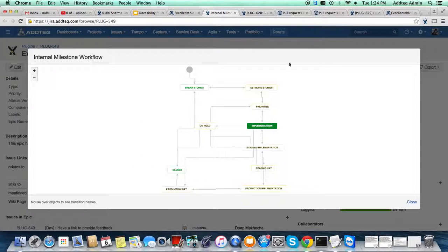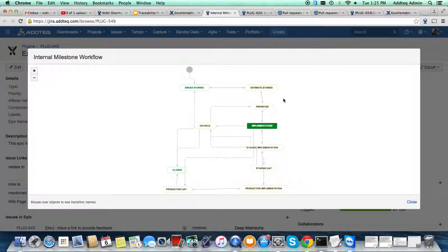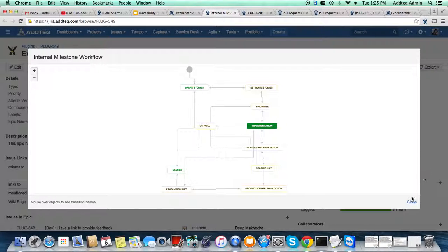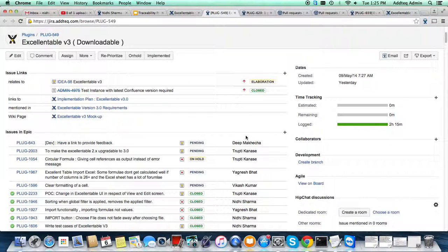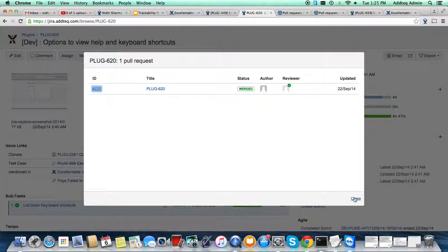This is the workflow — we have created our own as per our need. Based on a company's requirements, we can create customized workflows too. This part covers breaking stories, estimation, and prioritization, which is related to requirement management covered in Confluence. In the implementation phase, to achieve one feature we have multiple stories. If the epic is in the implementation state, the story tickets get assigned to developers.